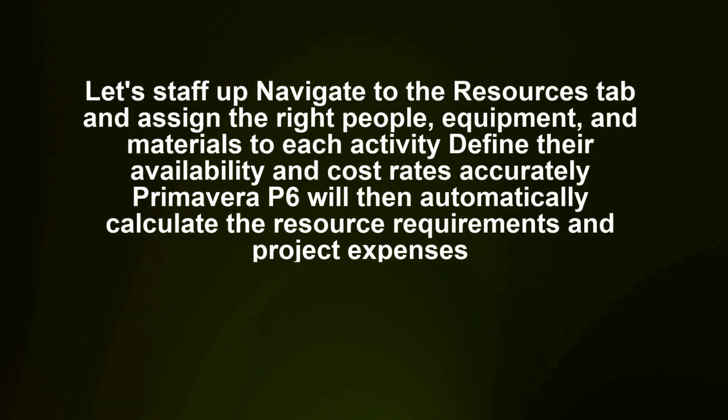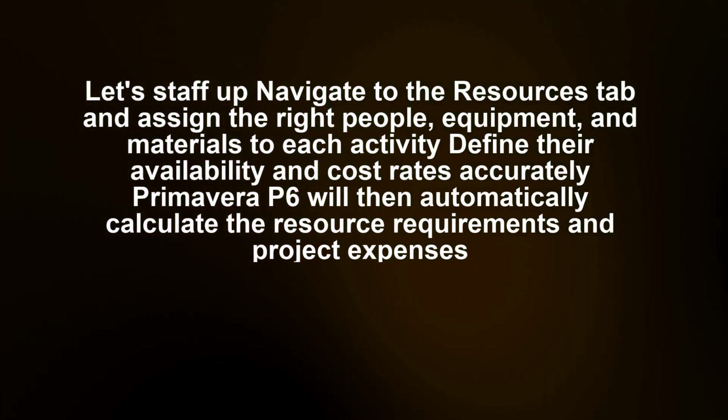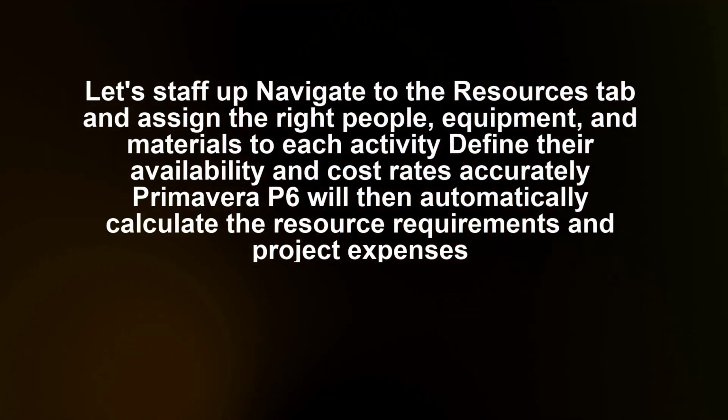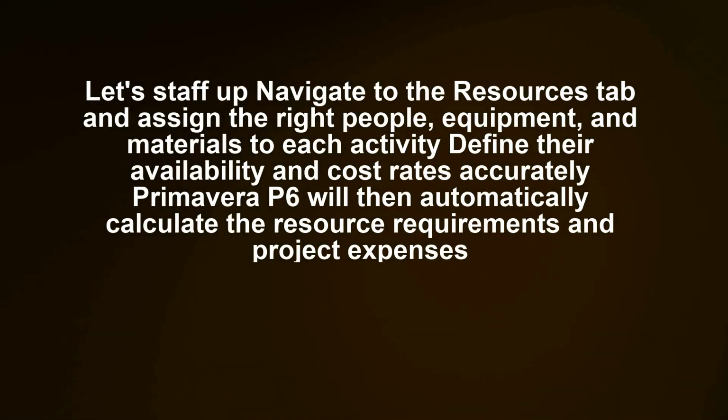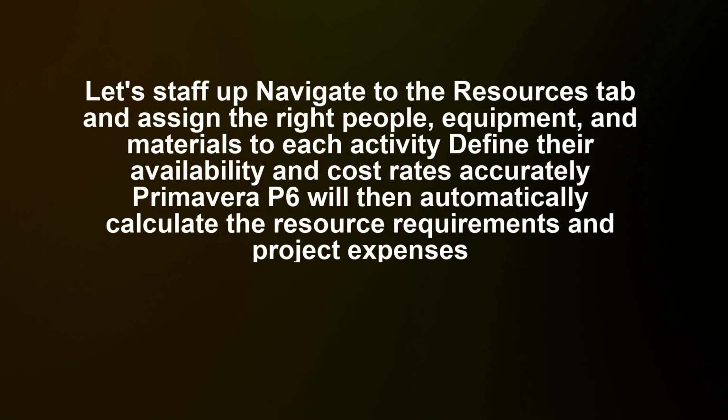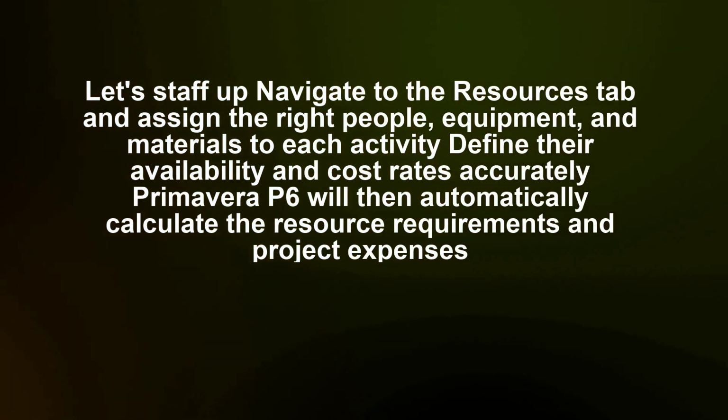Let's staff up. Navigate to the Resources tab and assign the right people, equipment, and materials to each activity. Define their availability and cost rates accurately. Primavera P6 will then automatically calculate the resource requirements and project expenses.